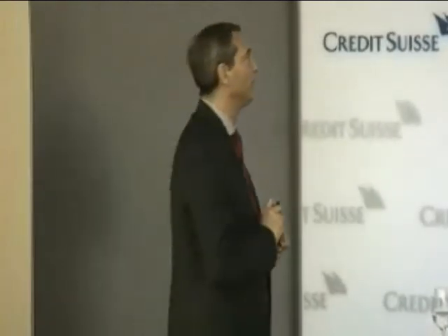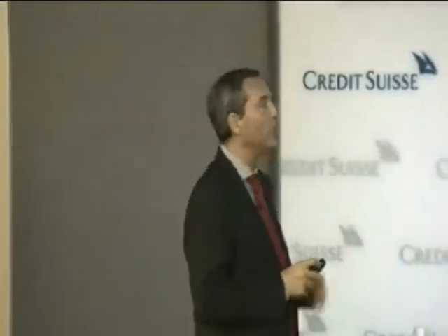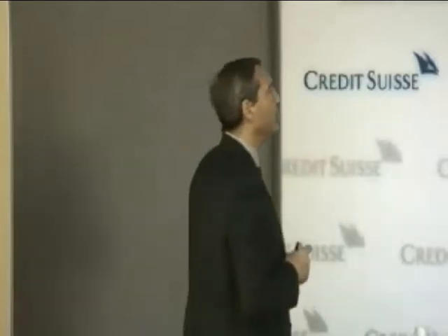It's possible to identify 3 steps. The first step is to identify the risk. The second step is to quantify the risk, and in order to do it, to fix the tolerance of the risk level. The third step is to manage the risk.